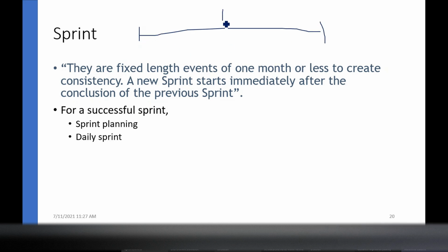The sprint might be 1 month. 1 month means there might be around 20 working days, plus or minus 1 or 2. For a given worker, it might be 8 hours per day. That means 160 hours per month.